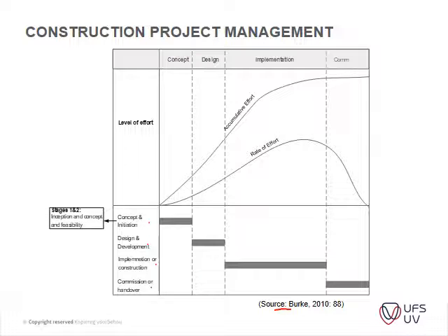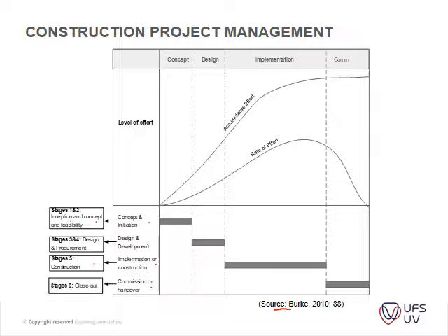Whereas the construction industry has stages 1 to 2, which is your inception and concept feasibility. We have stages 3 and 4, which is our design and procurement stages. Then we've got our construction or implementation phase, and then we've got our closeout phase, which just feeds into phase 1 and 2, or into one again. So whenever you're doing tenders again, you would pull out a previous project and you will start there looking at possible rates.